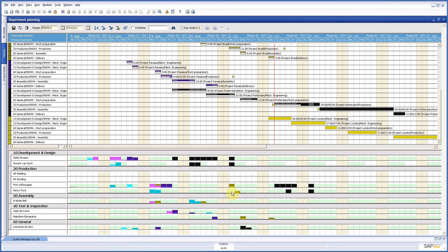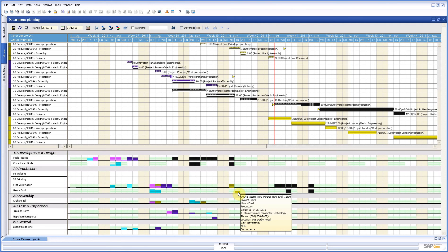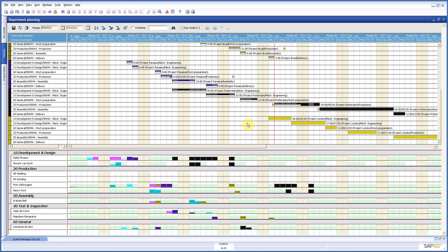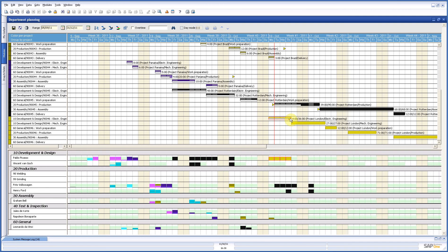Now, how does that show? If I go here with my cursor, I see this. This is for project Brazil. And it's four hours, which I gave out here. Now, this is very, very handy. And it works very easy. What you do, you pick up your activity, go to the department you want to have it worked on, and you release it. Now, you can see, in total, there were 36 hours. I already gave out these, and I still have left four hours.